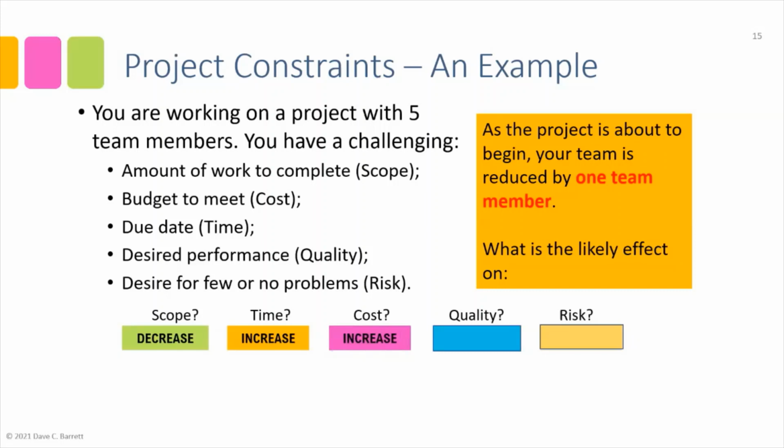They're going to have to work overtime, which in most organizations means extra money, time and a half, working weekends. You might have to bring more people in, and they tend to be less experienced. They may go through a learning curve, or you start to get inefficiencies when you start bringing people in. They start to become less efficient, which increases the cost. So there's a cost increase implication.